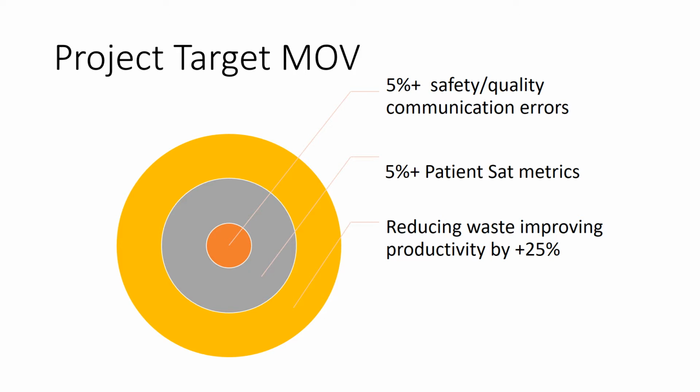The technology will also be deemed successful if patient engagement satisfaction metrics of diagnostic imaging improve by 5 points within 3 months of implementation. And lastly, the technology is going to be deemed successful to the organization if the provider relations are improved by measuring waste time of coordination of care through a productivity measure of 25% increase within 9 months of implementation.